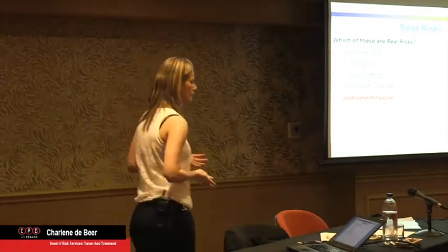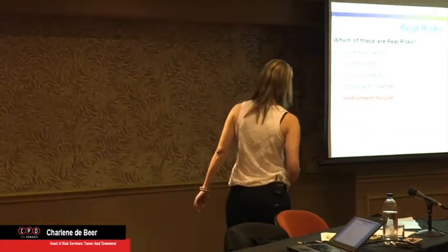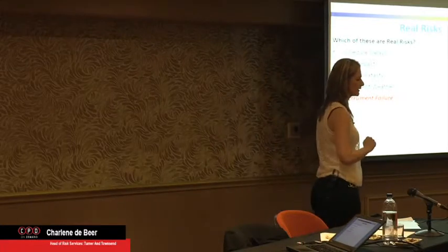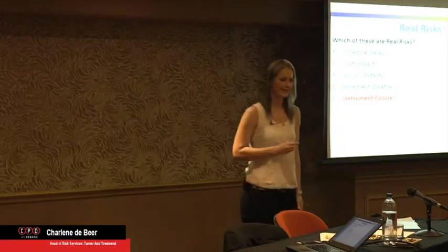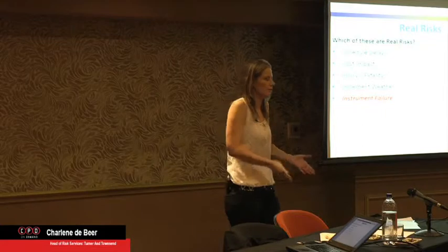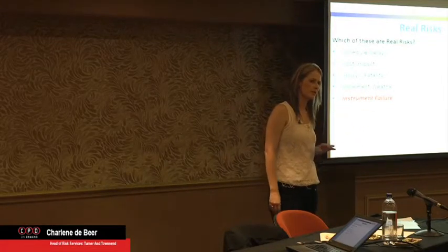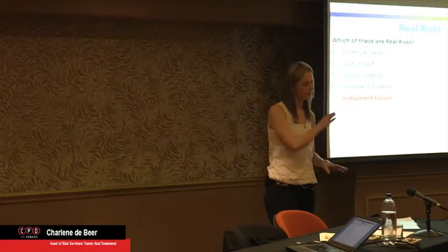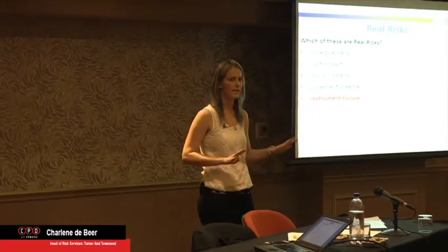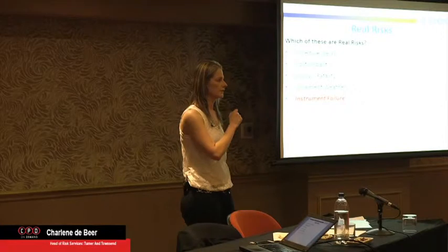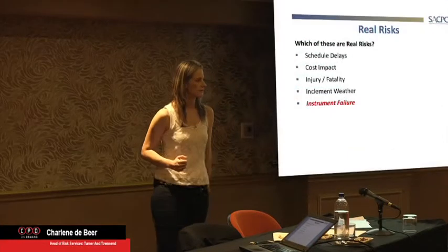If you do get to this dead halt, and you're 100% right, because this is a lot of things that we face, is, well, what is actually the real risk? What's the cause and what's the consequence? Unpack them in various scenarios. So take it as a real risk. Take the risk as a cause, because you can unpack them. And then start focusing on your treatment and your mitigations.